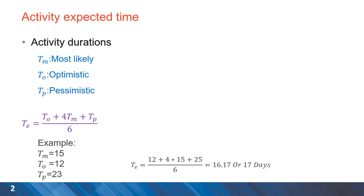For activities, sometimes we have an optimistic estimation of the time, a most likely estimation, and a pessimistic estimation. If that is the case, a triangular distribution will be our distribution for the duration, and we can calculate the expected time using the formula: the sum of optimistic time plus four times the most likely duration plus pessimistic time, divided by six.